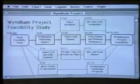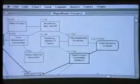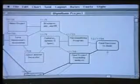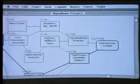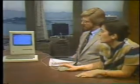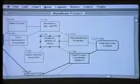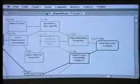For example, here we have a development project being planned out with all the resources and the scheduling, and you can easily see the progression of the project, what's in the way, all the milestones are sketched out. If I, for example, want to say, oh, well, this becomes a major milestone, I can easily change that to a milestone right here. And now the project knows that this is something that absolutely has to take place before anything else can be completed. And so it's very visual, and you can enter things and plan things out.